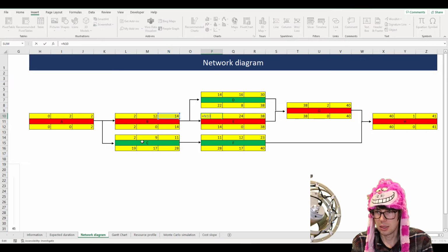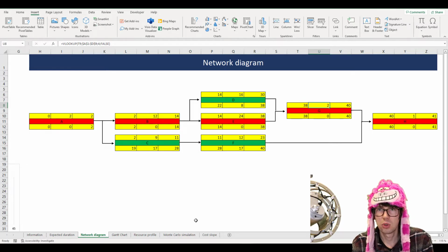As you can see, I just did it manually here, but there are more automatic ways you can do this sort of thing. So once you have done the network diagram, then you can start making the Gantt chart, and it's pretty straightforward. So remember, we need certain inputs there. We need the list of activities, we need to know the duration, but the things we need from the network diagram specifically, that's the earliest starting time and the float.